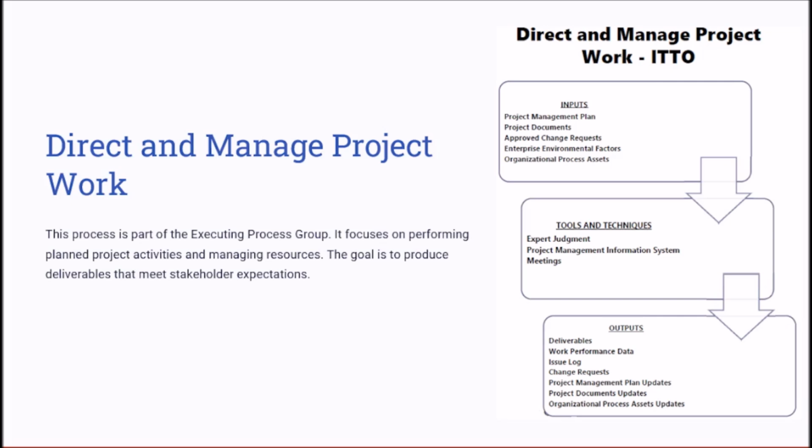And the ITTO involved in directing and managing project work. It's integral to the direct and manage project work process: inputs like the project management plan, which provides a blueprint for the execution; tools like expert judgment and PMIS, which assist in implementing and monitoring the work; and outputs like the deliverables and work performance data, which reflect the progress and the results of the project.